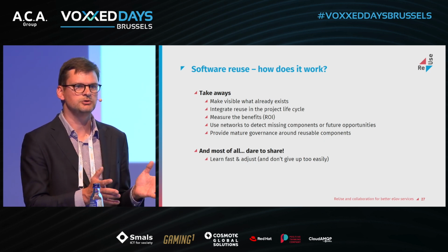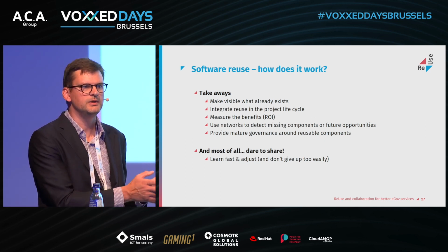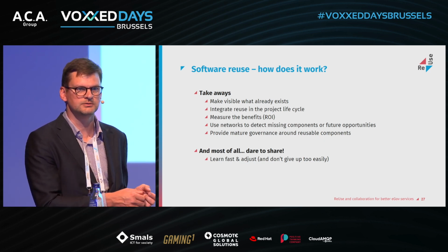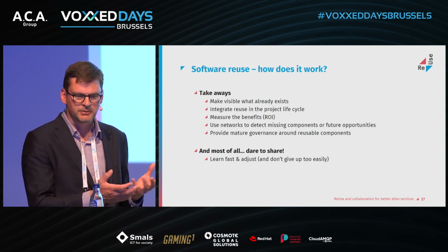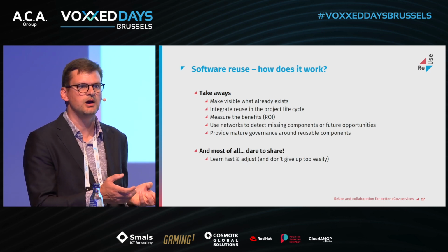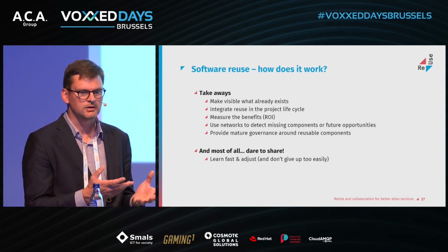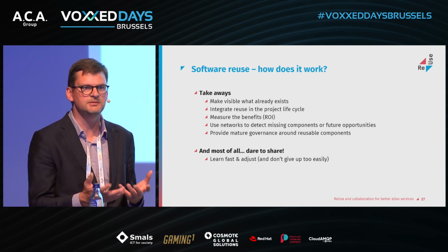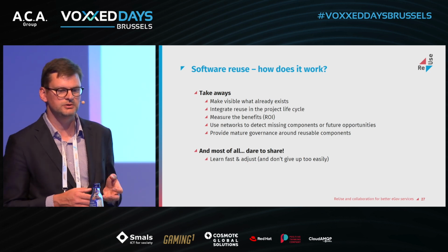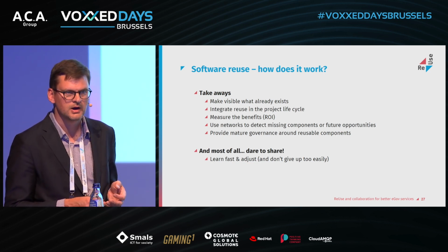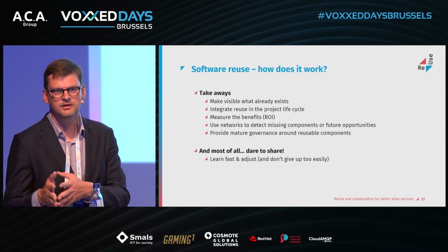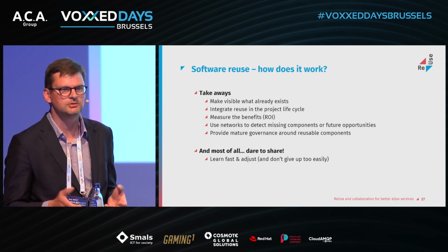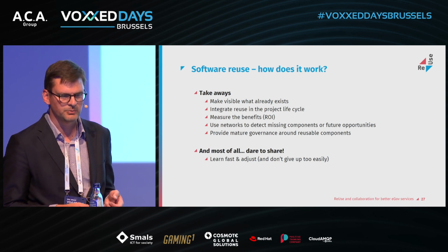So the earlier you are in detecting these components, the more possibilities you still have to adapt and to go into discussion with the teams that provide the reusable components, of course. Once you are in the development phase, often you are too late to still see some opportunities.